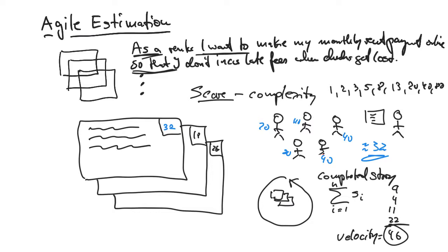You get 1 times the velocity of the sprint from 3 times ago, plus 2 times the velocity of the sprint that was next to last, plus 3 times the velocity of the sprint that was most recent, and you divide all of that, of course, by the sum of the weights, by 6. And then you add 10% to that.